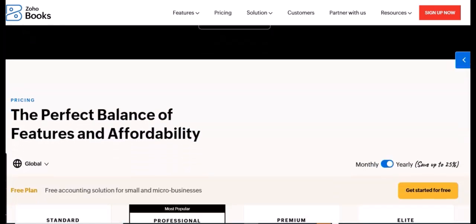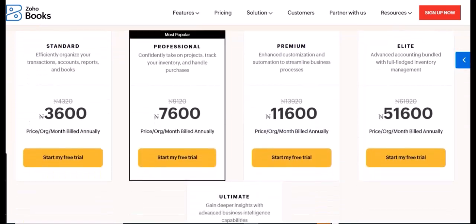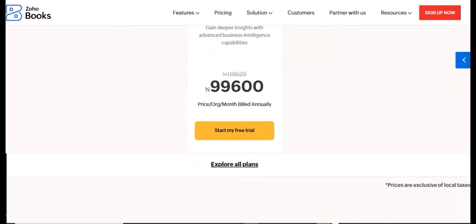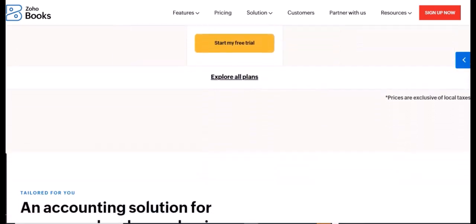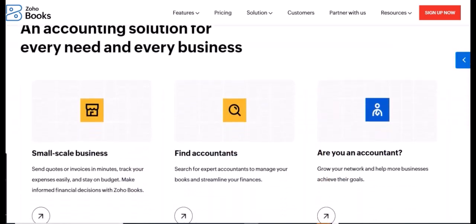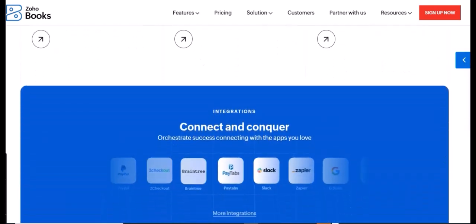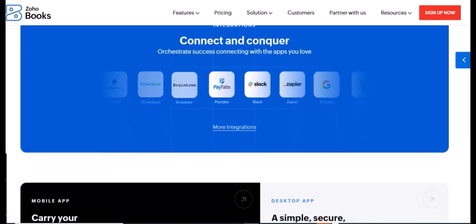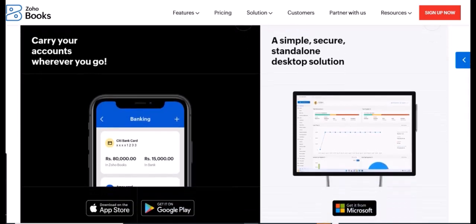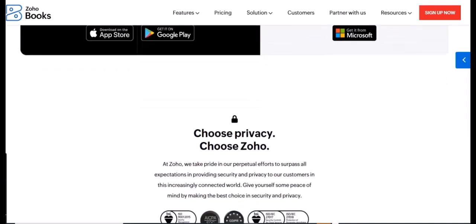Resource utilization reports, providing insights into team members' workloads, helping to prevent burnout or underutilization, and enabling better resource allocation. Budget tracking, monitoring planned costs versus actual expenditures to keep projects financially on track. Detailed reports and dashboards, offering a variety of customizable reports on task status, progress, issues, time logged, and financial health. These reports provide project managers with the insights needed to make informed decisions and communicate effectively with stakeholders.